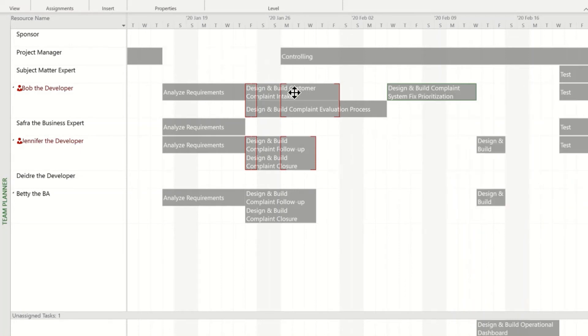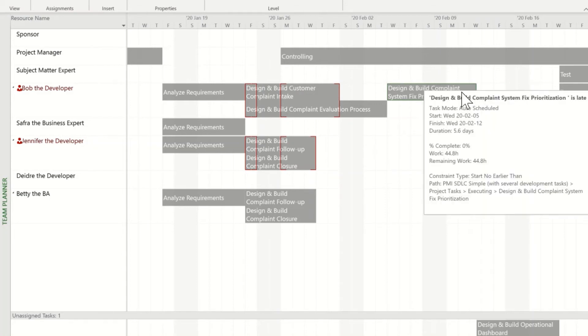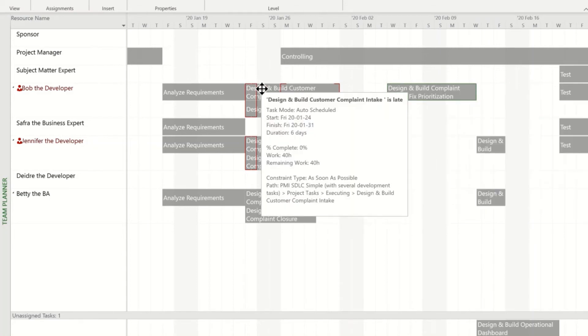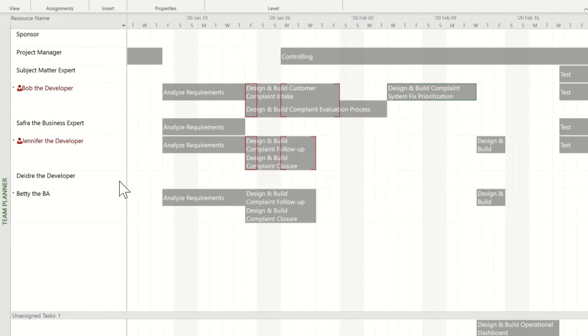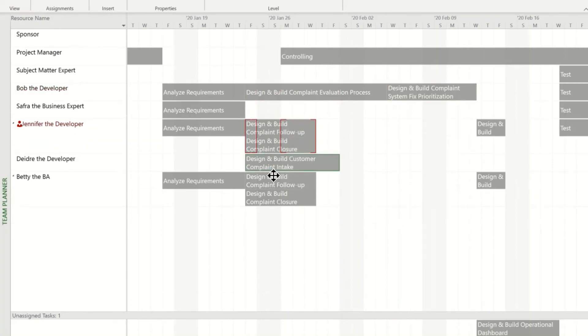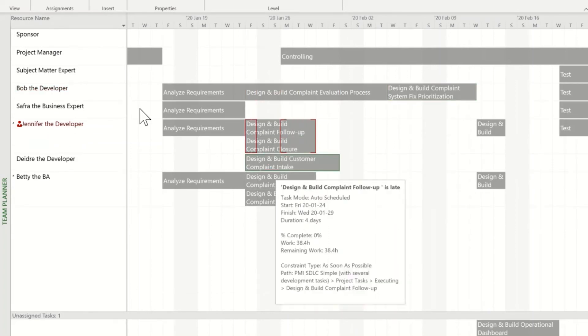How can we solve Bob's over allocation now? We don't want our project to run much longer. Is there someone who's under allocated or unallocated that we could assign some of this work to? Sure enough, Deidre down here is unallocated. Let's move some work to her. It's as easy as dragging and dropping. Now we've fixed Bob's over allocation problem.